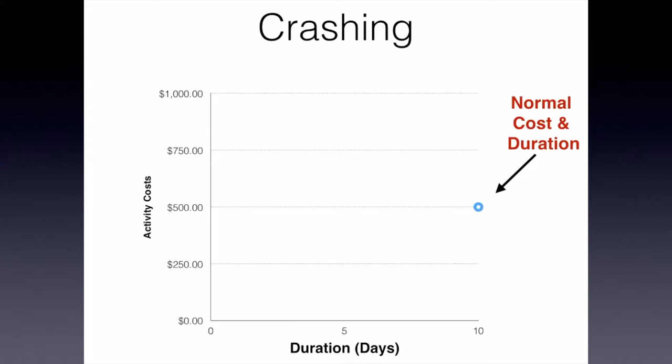Here we have a graph that shows the cost of an activity versus the time that it takes. We have a point here of our normal cost and duration — so this particular task is going to take 10 days and cost us $500.